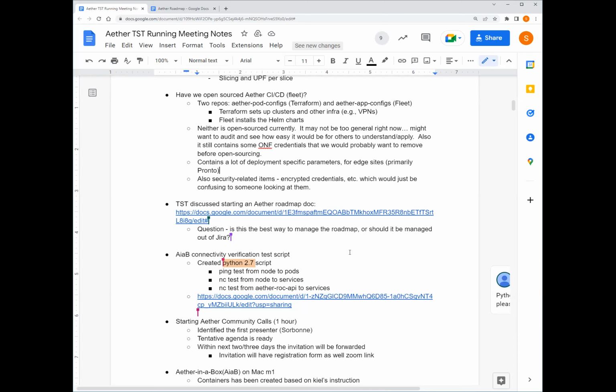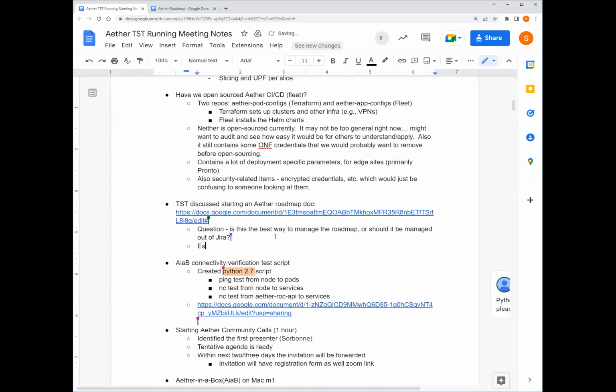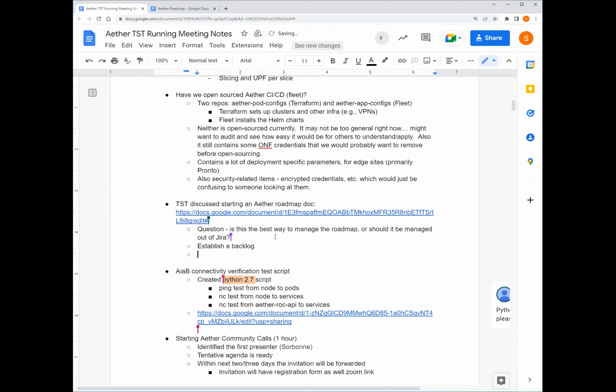Yeah, I think there's two ways I would tackle this. One, I think we need to create what I'll call a roadmap backlog. What are all the specific development items that we want to tackle? And then begin to prioritize them and group them into relevant releases to say, okay, we're going to tackle this subset as one deliverable, and the rest move to the next.